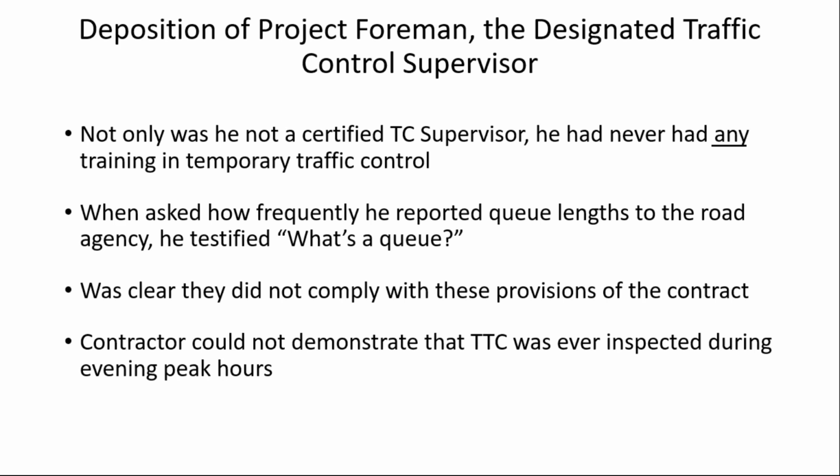And believe it or not, he testified, what's a queue? So clearly he didn't have the requisite background or knowledge to be able to do the things the contract called for. And the contractor could not demonstrate that the temporary traffic control was ever inspected during the evening peak hours, which is when these crashes were occurring.